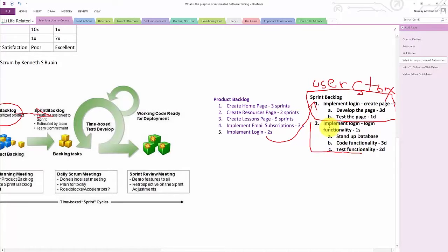And we broke them down into multiple user stories, and now we're going to tackle these sprint by sprint in this time box sequence. Once we finish one that has been fully developed and tested, we're going to take in another one and we're going to finish it. Once it's been fully developed and tested and the code is production ready, we'll pick up another one and we'll bring it into our sprint. And we'll keep doing so. And the cycles will keep on continuing.